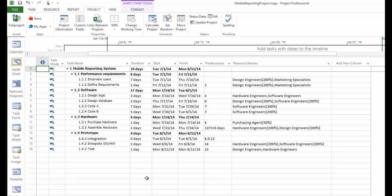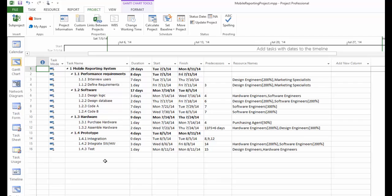We are going to change all our task types back to fix unit. Remember when we first set up the project file, we made all new tasks as fixed duration. We did that so when we assigned resources by changing the resource amount, the duration would not change. But now, when we are done with project planning and right before we start to run this project and track the project information, we want to change all the tasks back to fix unit. So when we start on certain tasks, we can complete partial task count by the percentage of the work.